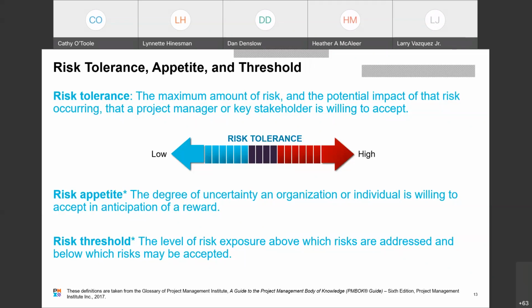In the state of Florida, they want all billing systems to do something called rounding: round up to the nearest whole dollar if it's above 50 cents, or round down if it's 49 cents and below. It costs in one of our billers $150,000 to fix, to make that methodology work in Florida.